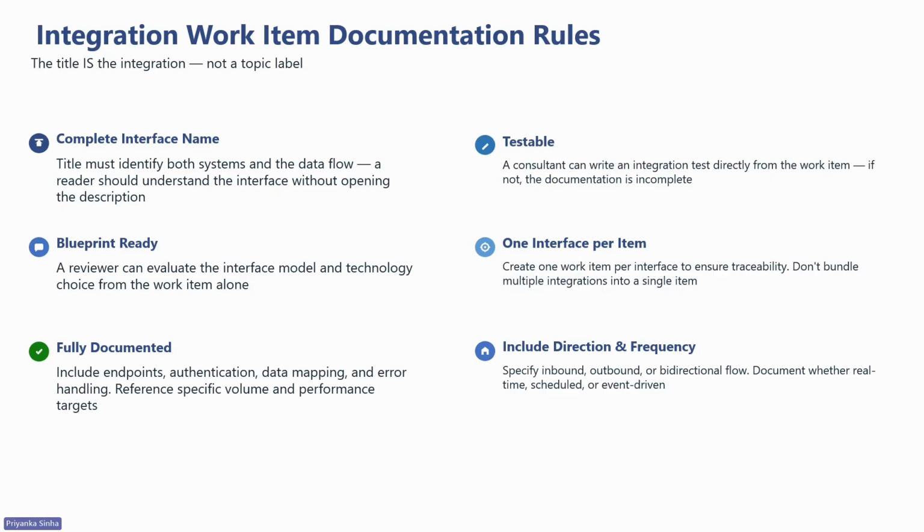And third one is it should be fully documented: include endpoints, authentication method, data mapping, error handling, volume, and performance targets. Yes, all of it is very critical for any integration or interface. If you don't know these details yet, that's fine. Create the work item with what you know. Mark it as requiring further definition. But the expectation is that by the time you are in build, these are complete.